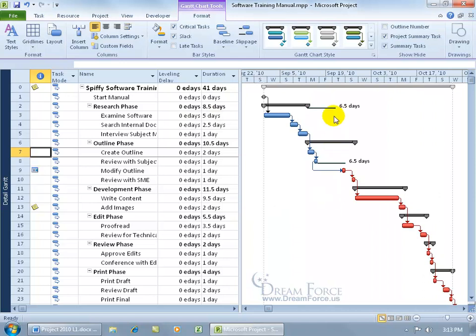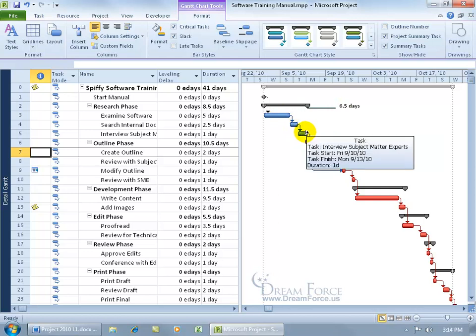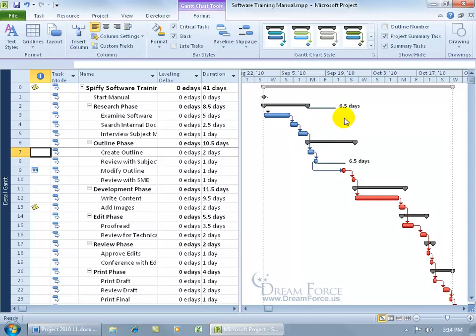So it not only shows the slack time, but also the number of days that you have. You can be a slacker for, well, the research phase, six and a half days. So I can knock this out one day, that two, that maybe one. I'm still under six and a half days before it becomes critical.